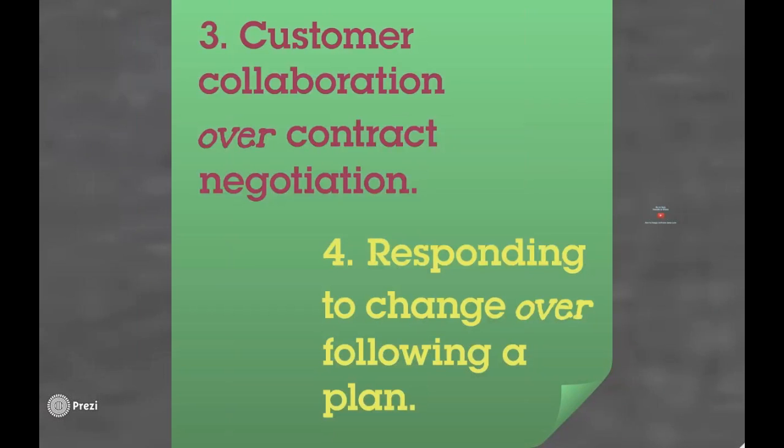Having a plan is important because it sets the direction for where you want to go. You need to have an idea of, well, which way are we going? But oftentimes, especially I've seen this in waterfall teams, they'll have all the analysis, everything up front, but the beginning of the project is a time when you have the worst information, the least amount of feedback, the least amount of data, and to stick to a plan that was conceived at the moment when you had the worst information just makes no sense. And so the idea here is that as information comes in, as the scope changes, you are adapting and making adjustments. Otherwise, you're just doomed to have lots of difficulties.